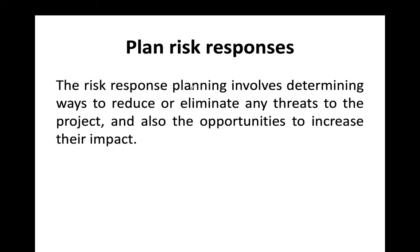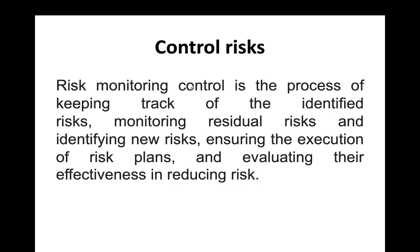Plan risk response involves determining ways to reduce or eliminate any threats to the project, as well as opportunities to increase positive impacts. We create a response plan against identified risks — if a particular risk occurs, our action will be this; we will perform such steps to minimize damage proportionally.